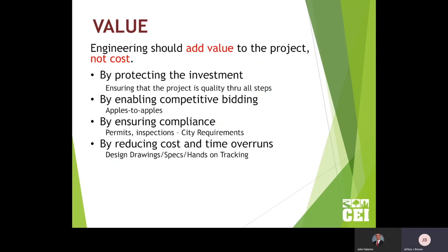What that means is I can't say I want a car. What kind of car? There's a million opportunities. Even if I get real detailed, I could take a whole sheet of paper and list that, and I still end up with questions. Engineers, we have to do the drawings right and the specs right and put that detail into it, so that when you ask for pricing, everyone is down to the last nut and bolt giving you the price for the exact same thing. And that's where the competitive pricing is realized when you create that situation, reducing the overall cost to begin with.